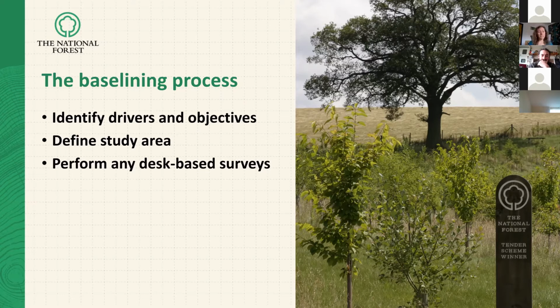Then you perform any desk-based surveys. Nowadays there's loads of information that you can get just from your computer, such as mapping to get broad habitat classifications. You can contact your local environmental records centres to see what records already exist for the area. That will help you to plan and design your fieldwork programme, and make sure that you're collecting data that's going to be useful for you.